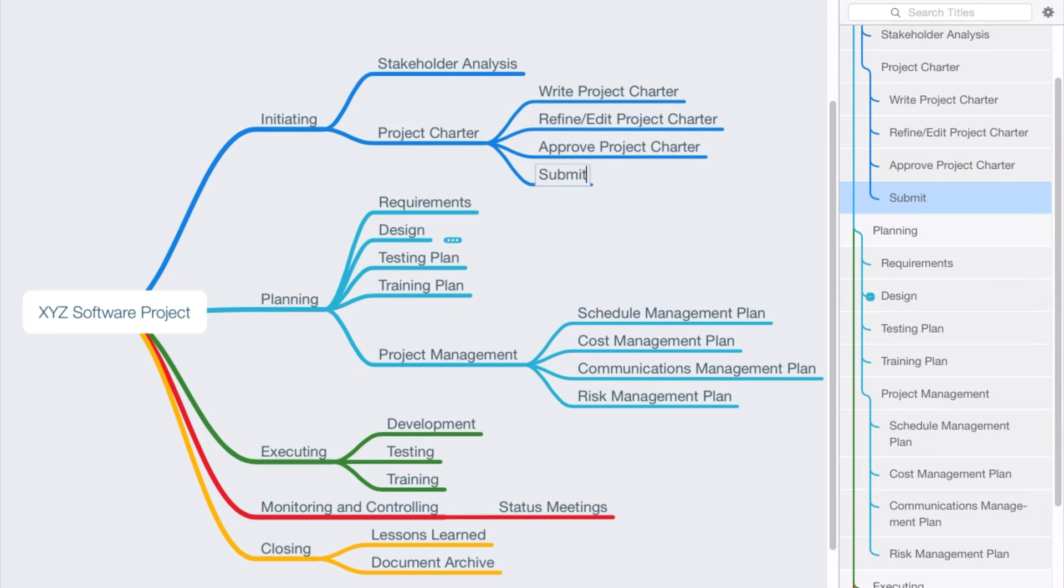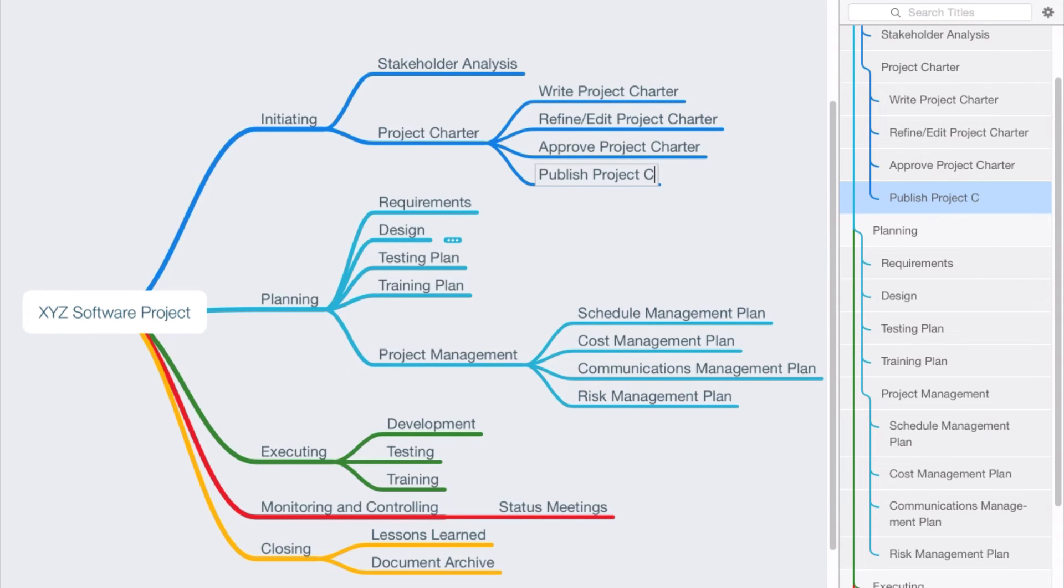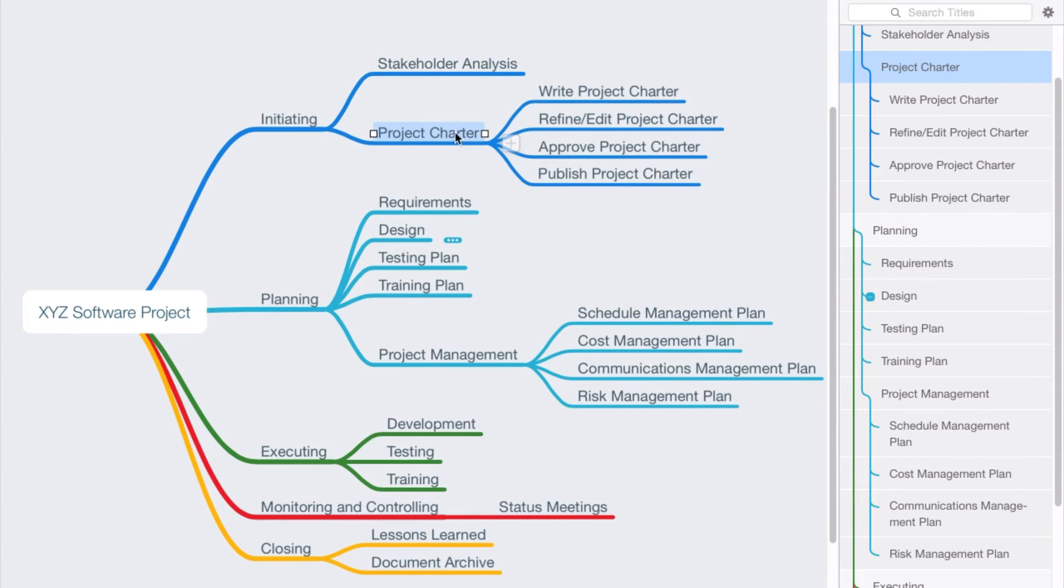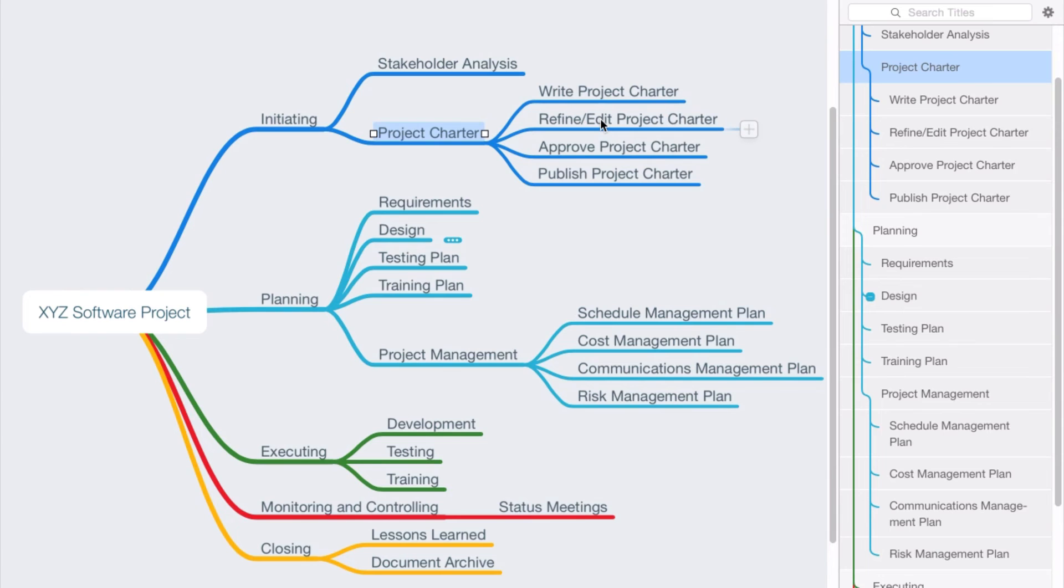And we might say submit or let's say publish the project charter, where we're sharing the charter with the appropriate stakeholders. So notice now that we've taken this item that's in noun form and we've identified these activities, and each of the activities begins with a verb, and these are the things that would end up in our project schedule.